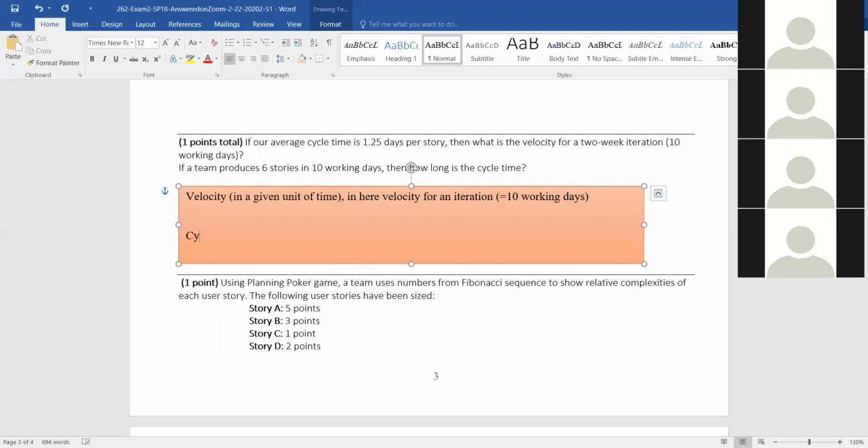And then we want cycle time, the average time it takes to get a story out of your current phase, sprint, depends again, out of a given time-boxed phase, iteration, and so on.